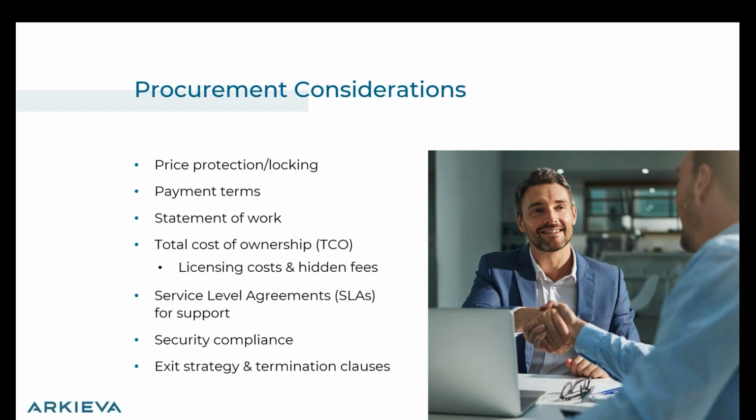I'll make sure to document the total cost of ownership. I'll make sure to get agreement on service level agreements because I need to know if they will respond within half an hour or if they will respond within 2 days. I might want to decide what exit strategy and termination clauses might be there.